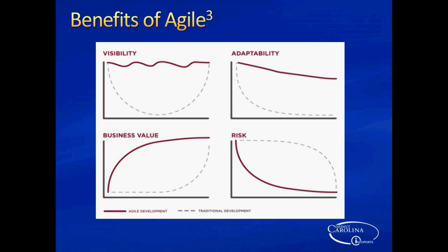What inverts the risk curve? I think isn't it the fact that you orientate so tightly, right? And shorter development cycles. So instead of finding out at the end you have a problem, you're going to find out in Scrum within a 2-week period. And within Kanban, maybe not 2 weeks, but not a year and a half. Exactly. So that reduces the risks because